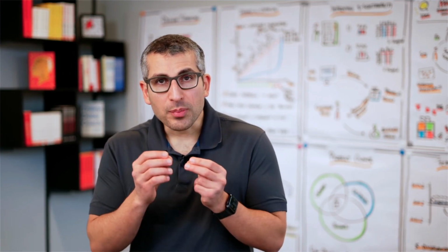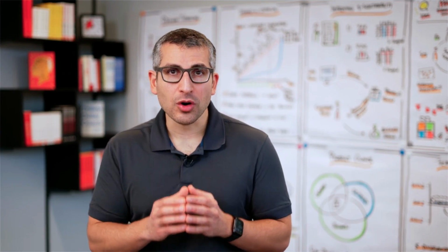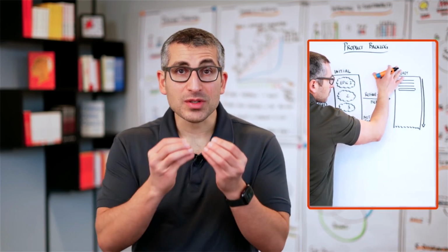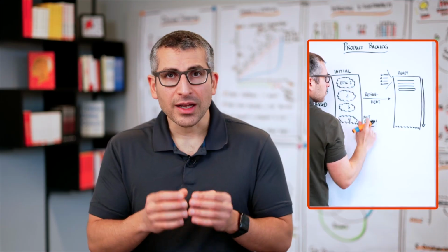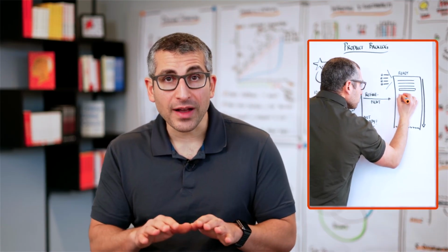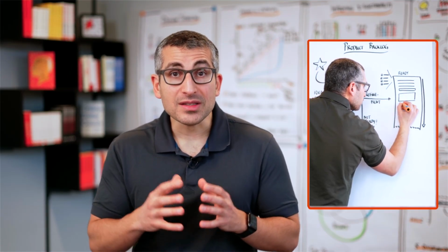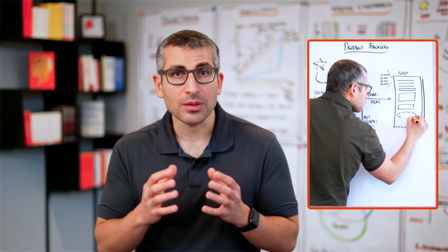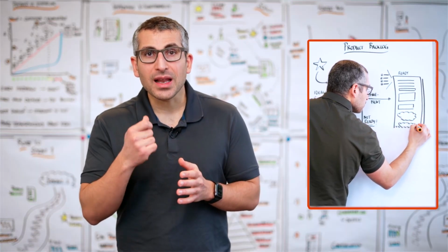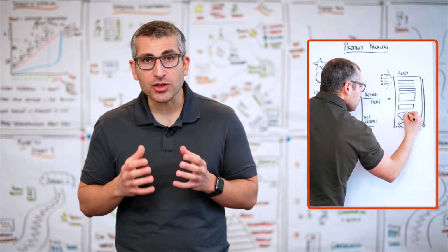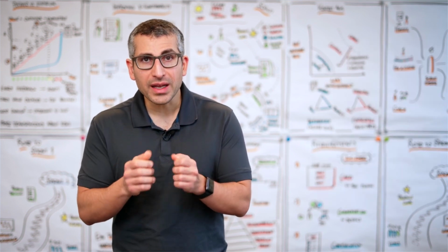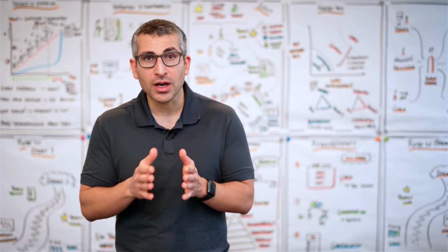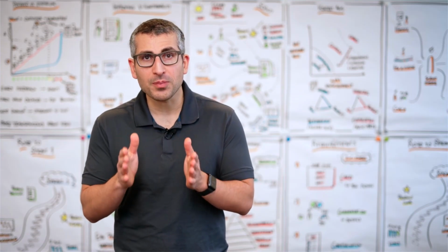Second, we want the product backlog to be detailed appropriately based on the prioritization. That means the items that we consider as valuable should be smaller and more detailed, whereas the items that are not so valuable right now, they can be still fairly vague. They can still be epics. That saves us a lot of time in the initial creation of our product backlog and allows us to move into delivery and development much faster, resulting in quicker feedback cycles.